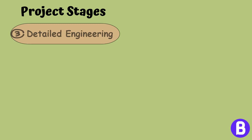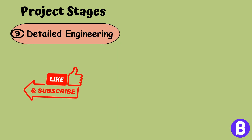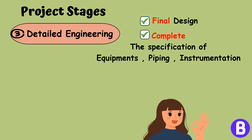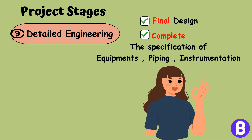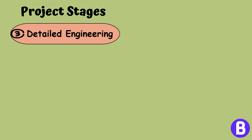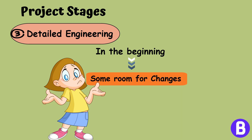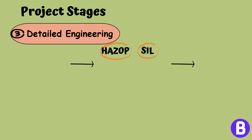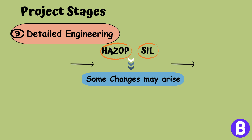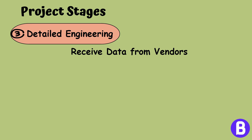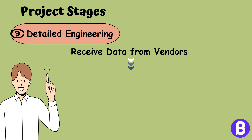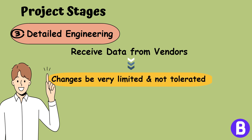The third stage is the detailed engineering stage, which is a critical phase where the final design and specification of all equipment, piping, and instrumentation are completed. Detailed design itself passes through different sub-stages. In its beginning, nothing has been purchased yet and there is still some room for changes. Then HAZOP and SIL sessions are conducted to challenge the design and ensure the system is well protected. Some changes may arise from the HAZOP outcome. After receiving data from vendors and incorporating it into the design, material has already been purchased, so changes shall be very limited and, in many cases, not tolerated.